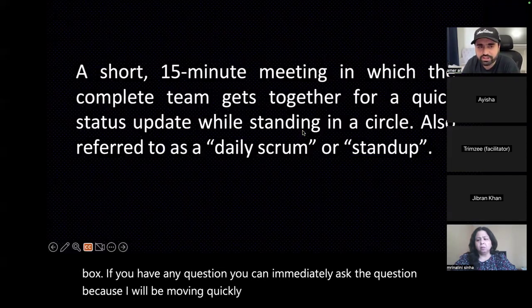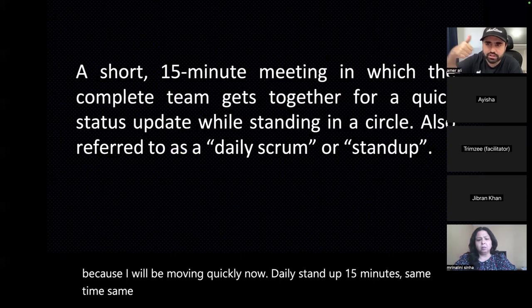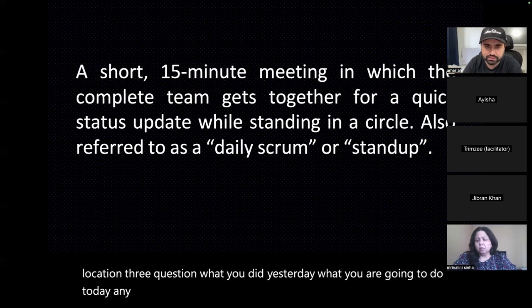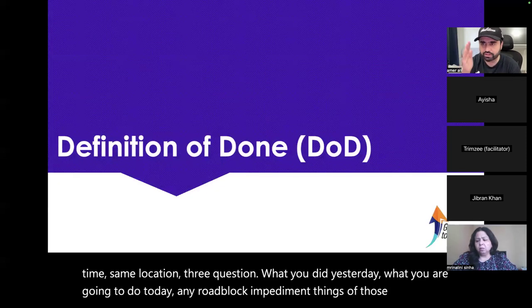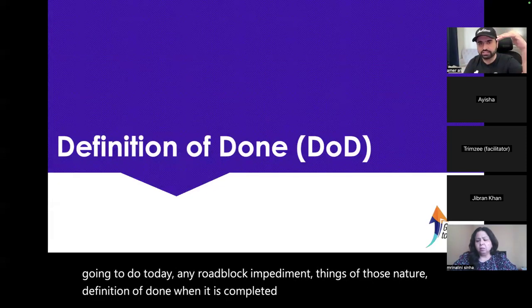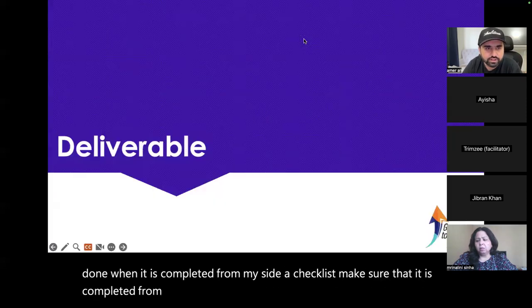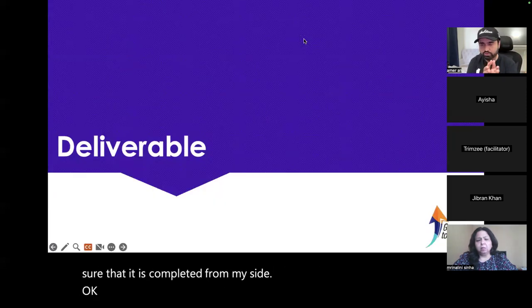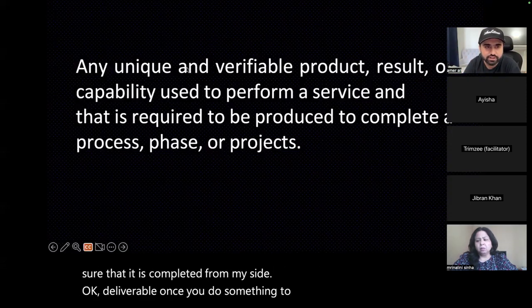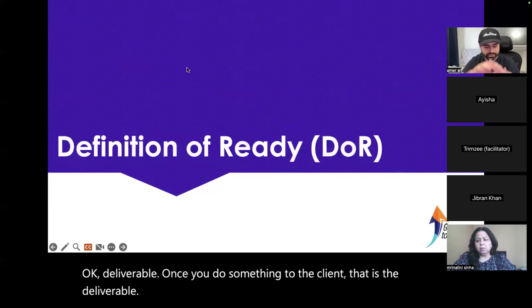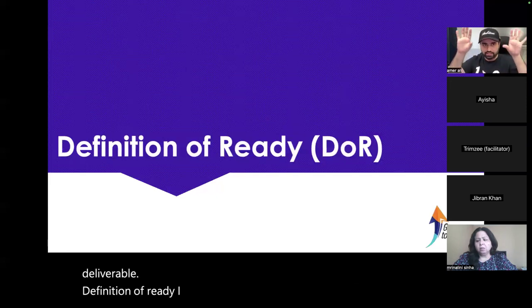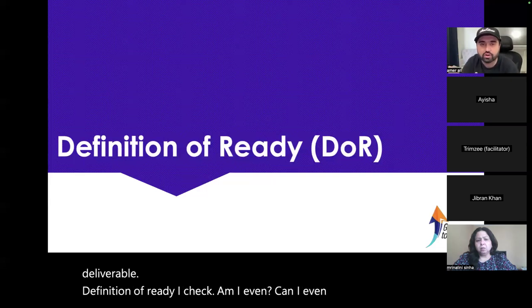Daily stand up: 15 minutes, same time, same location, 3 questions. What you did yesterday, what you are going to do today, any roadblock, impediment, things of those nature. Definition of done: when it is completed from my side, a checklist to make sure it is completed. Deliverable: once you give something to the client, that is a deliverable. Definition of ready: I check, can I even do that thing or not?